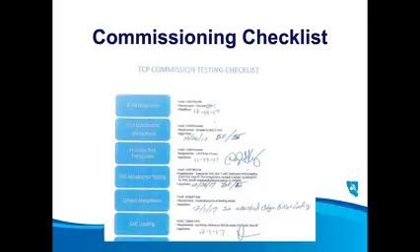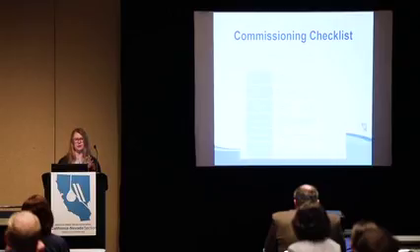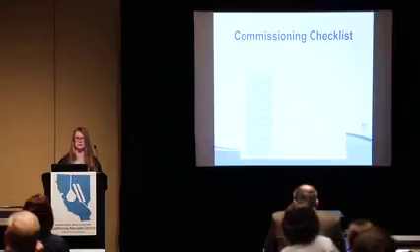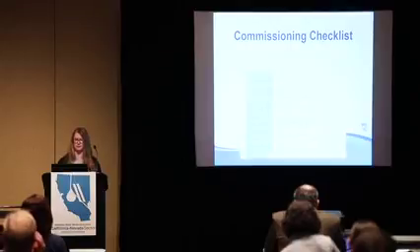Before we ran water to system, we ensured that our operations, engineering, and water quality departments all had reviewed the material and agreed that this system had been designed as appropriate and was ready to run to system. And I think this is a really important process to go through. It's something that is easy to forget at the end when you have this treatment system constructed. You really want to follow it through all the way to the end to make sure that you have everything designed as appropriate.